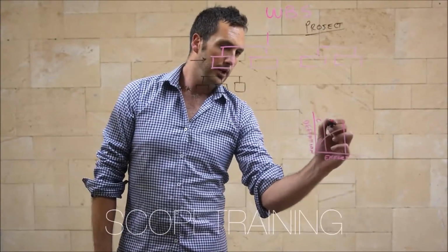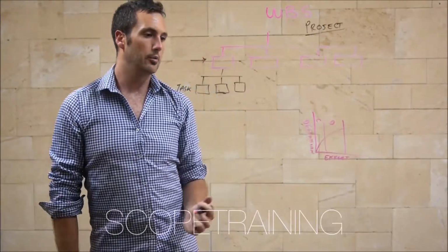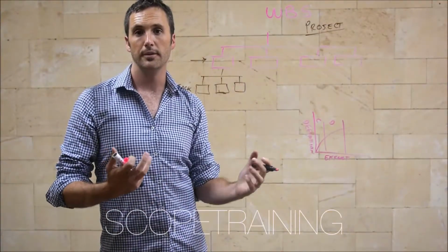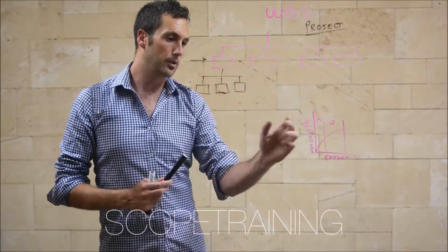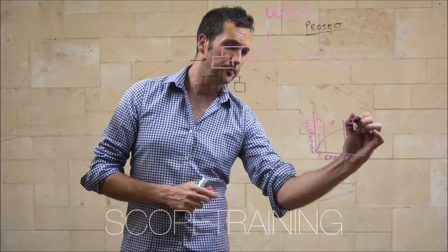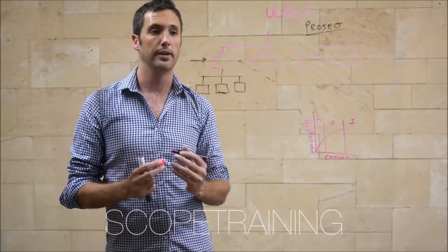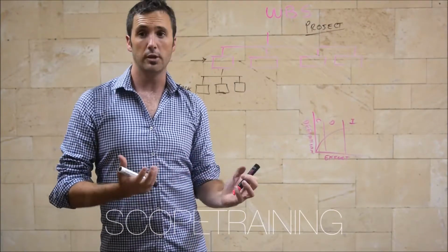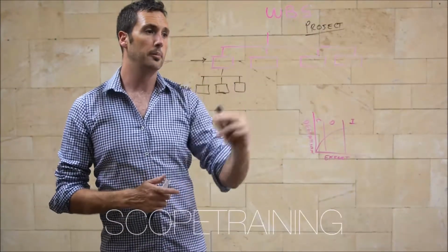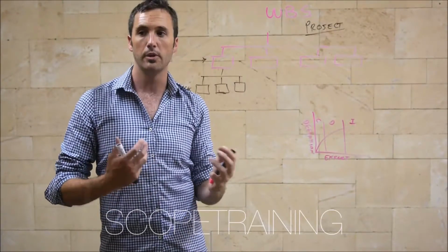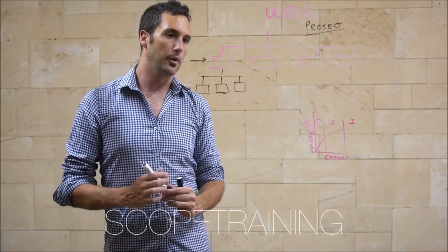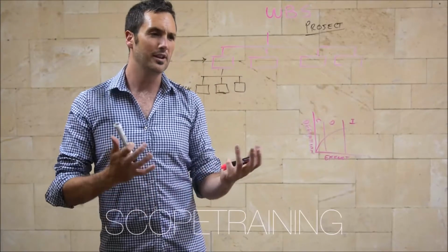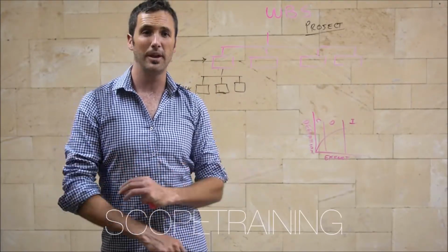However, once you start hitting the planning stage or the development phase, you want to have sufficient depth in here so the work can be done. And a lot of people go and hit implementation with a very loose work breakdown structure, which causes all sorts of issues. If you think about it rationally, we use this as the basis for all our other estimates, time, cost, and so on. So if this hasn't been done in sufficient depth, how can you get an accurate cost or time estimate?